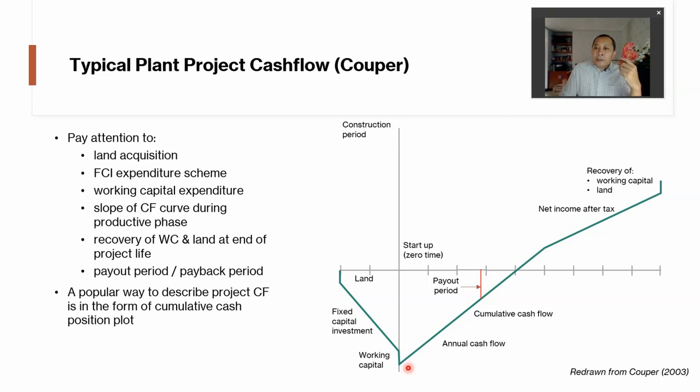And usually, for the purpose of economic analysis, the time equals 0, T equals 0, is the present time. So the project lifetime is calculated from this point onwards, okay? So from here, from the vertical axis to the right. This construction phase is usually not considered to be project life. Okay, so this is before the project was born, so to speak.